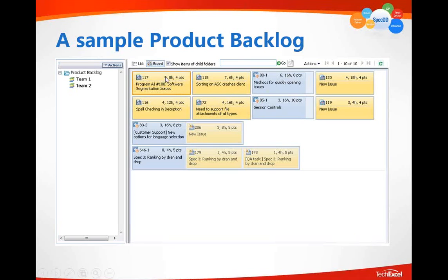Obviously, sometimes a priority value alone is not enough. There is a hidden value, which is the priority order. For those items sharing the same priority value of 4, 4, 4, 3 of them have a listing order in a hidden way. It's actually recognized and remembered, so that all the backlog items are always prioritized and listed.